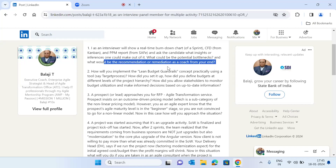To share my perspective on this question: a burndown chart can be used for progress tracking and also to know the remaining work, because a burndown chart visually represents the progress of the team throughout a given iteration. If the chart is trending downwards, it indicates that the team is completing tasks according to plan.